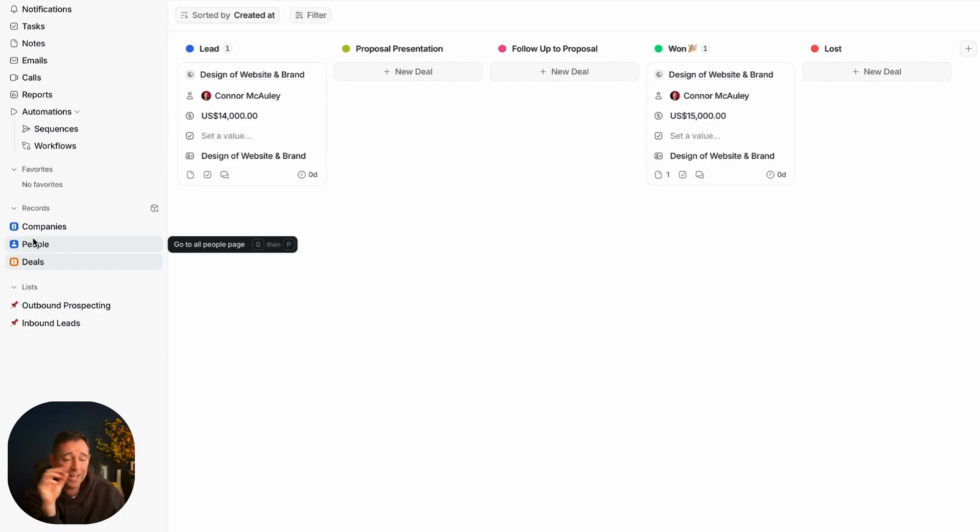And I can't tell you enough how often I've seen jobs being missed with billing because they've not gone through a proper process. And so you cannot load anything into a project management system like ClickUp or Teamwork or Monday.com until it has been built out into your quoting system. And that would be a massive rule that I would start whenever you start to build out your activity within a CRM. Cool. I think that's enough for this process right now.